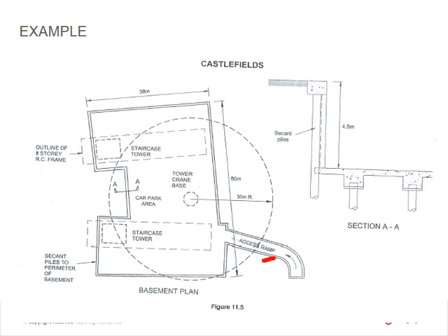Then you've got a second section, your resources: your supervision, your labor, your plant. You list all those items that you need to sequence here, and then they combine their health and safety within this method statement. So you can see significant hazards, and then you've got control measures. So there's their health and safety section incorporated, and then they've got their PPE there at the bottom. Okay, I think it's fairly straightforward.